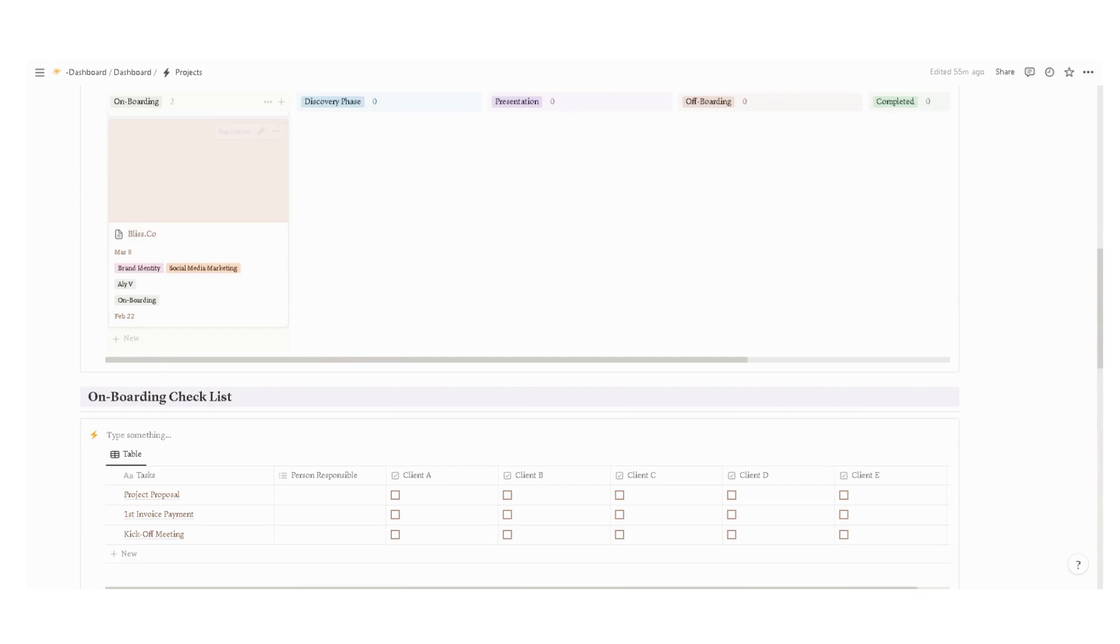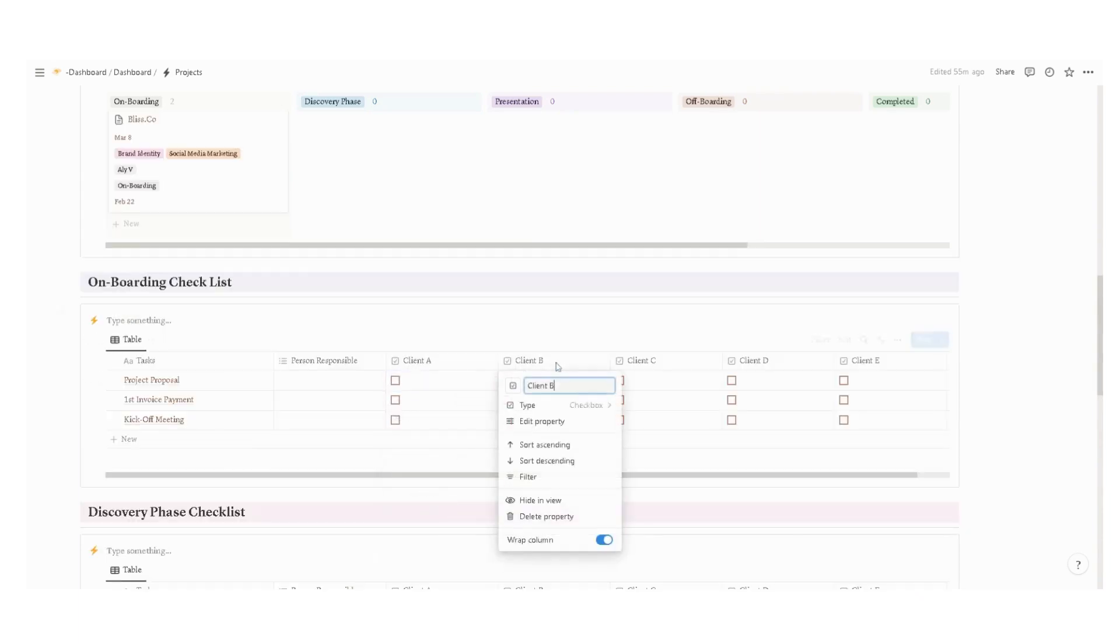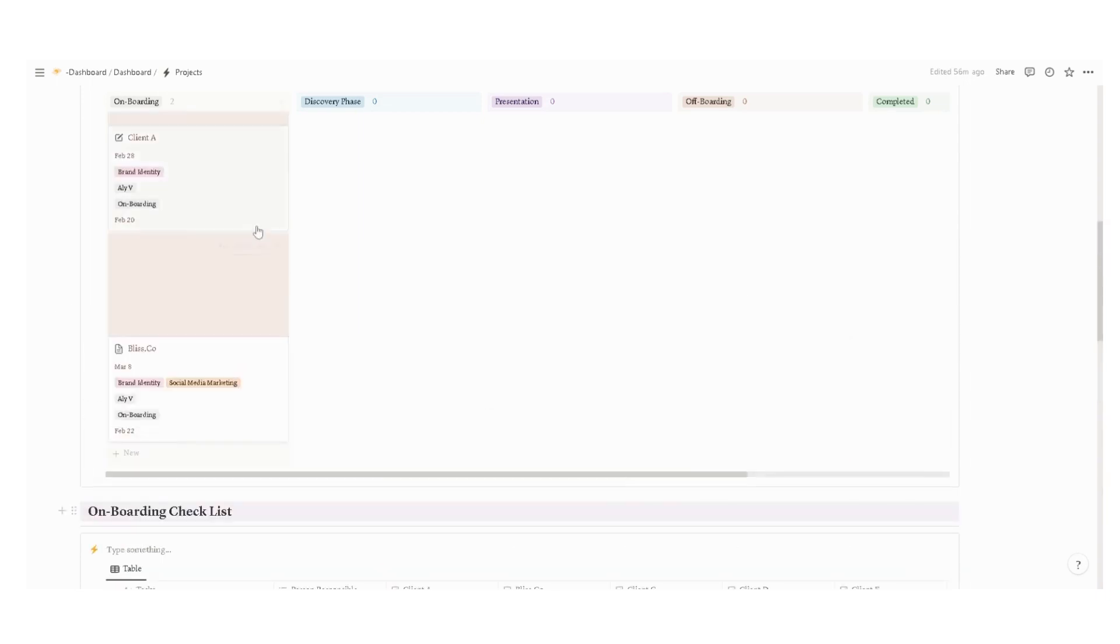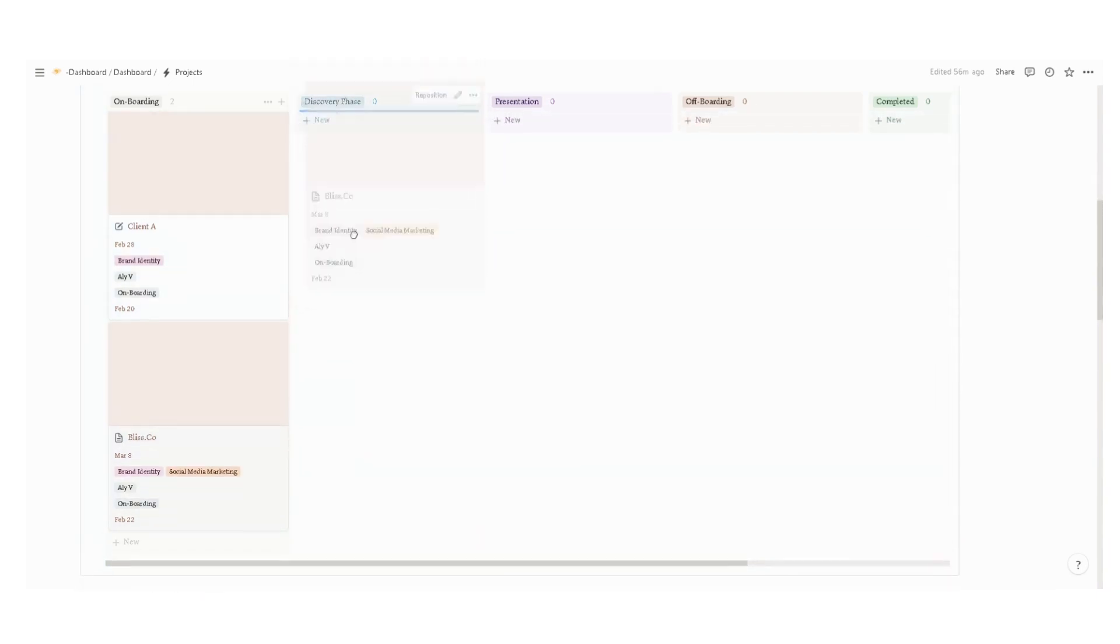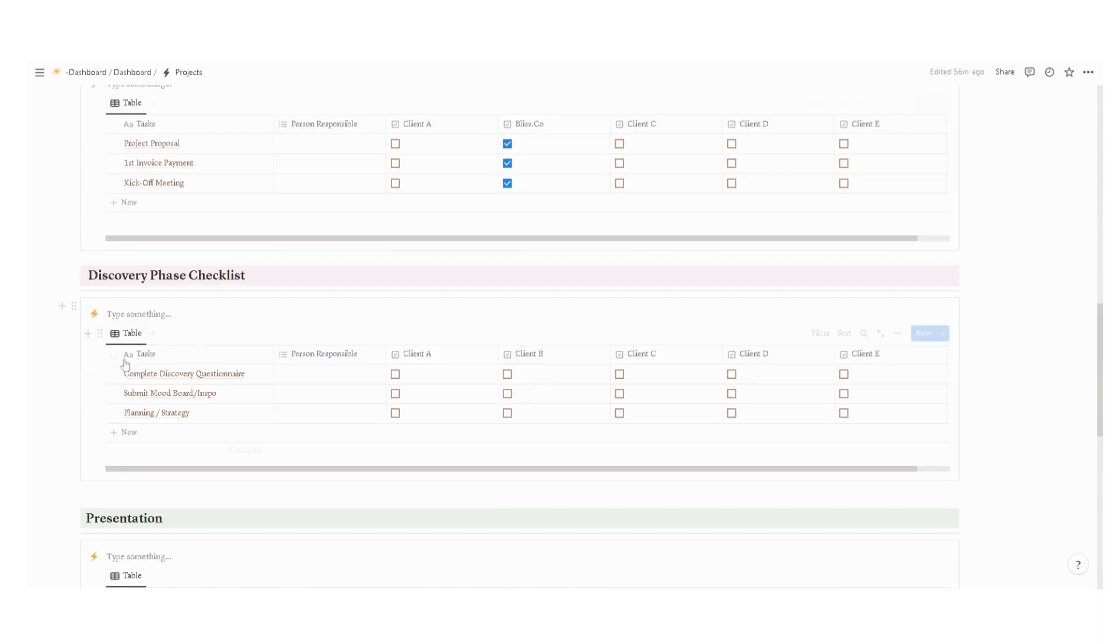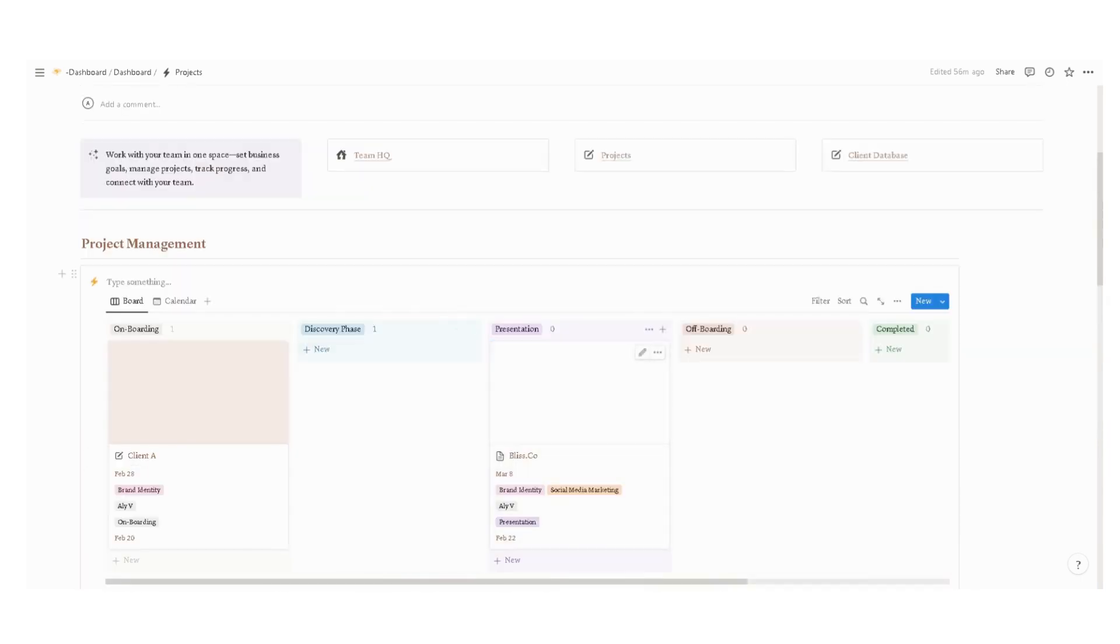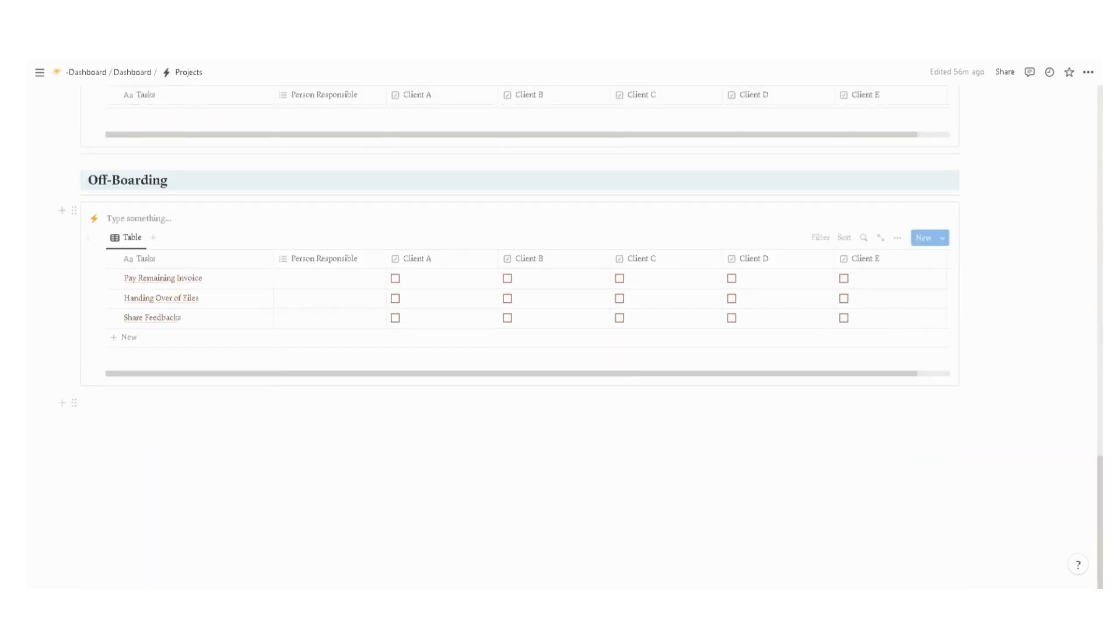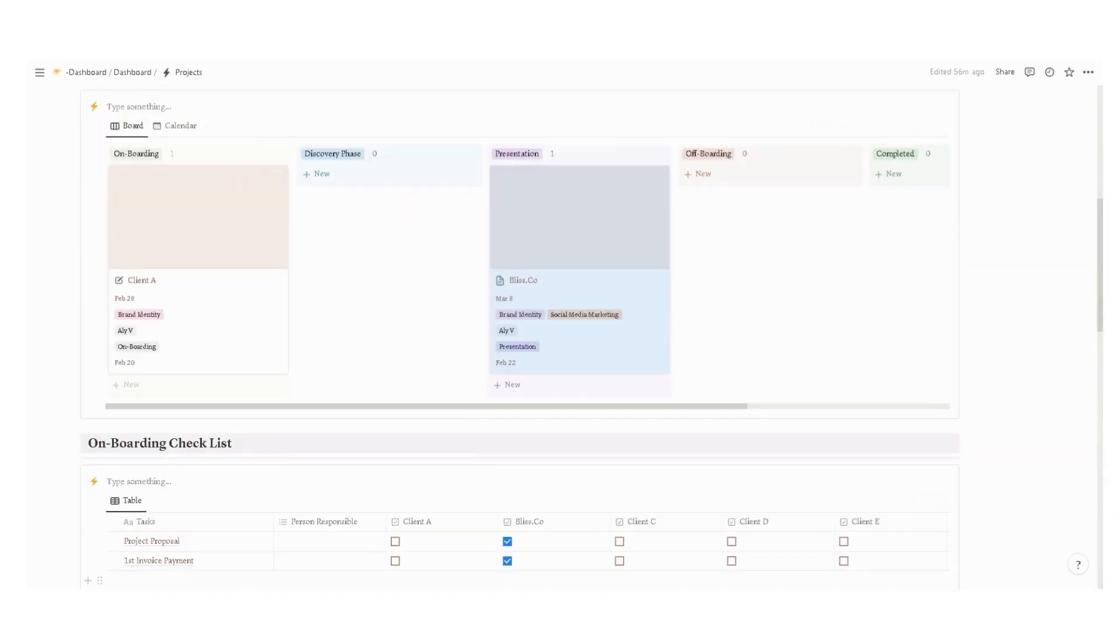For example, here we have Bliss and Co. Once you completed the project proposal, submitted the first invoice and kickoff meeting, you can now move this client into discovery phase. And then after you completed all the tasks under the discovery phase checklist, you can move it into the presentation phase until you complete the checklist for the off-boarding phase. That's it for the projects.